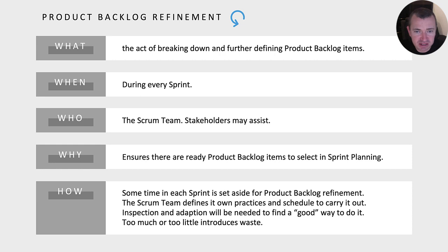A spike should have a clear objective and expected outcomes. It's a good practice to time box spikes, as research and learning can be unlimited and good enough results can be achieved by increasing understanding without seeking perfection.